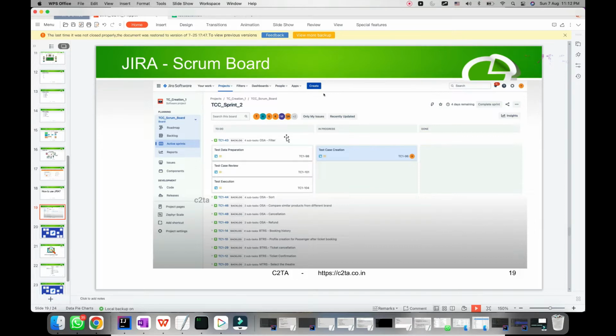In the sprint retrospective, the team members and the Scrum Master will be the participants, where we need to tell what went well in the last sprint, what went wrong in the last sprint, and what improvement is required for the upcoming sprints. So these things will be discussed in the sprint retrospective. Once that is done, that is the end of the sprint. Then from the next week Monday onwards we will start with the new sprint. So this is what happens in real-time projects.